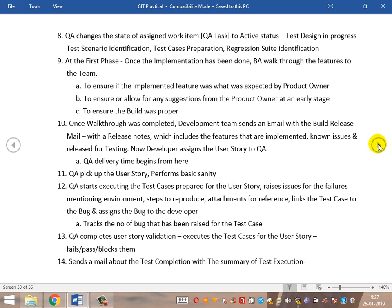Once the walkthrough is completed, the development team sends a build release mail with release notes containing the features implemented and deployed to the testing environment. Now QA starts their work — this is the point in time where QA delivery time begins for test execution. QA picks up the user story and performs basic sanity, which has already been ensured from the BA's walkthrough.